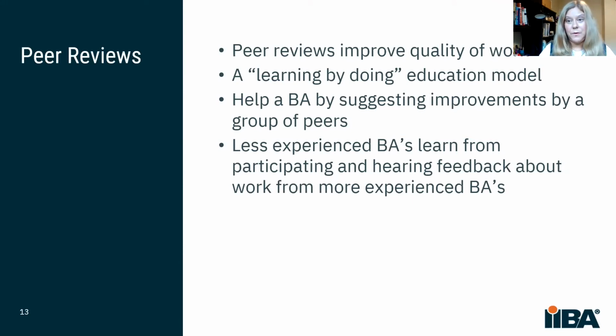We have a peer review in the second week of the sprint. We have an hour and a half where the team will meet, and we set it at that time because we want an opportunity, before we do our sprint review with our business and show them what we did, to show it first to our BA team, and also before we release. We do it at that time for those 2 reasons, because it's an opportunity to improve what we've been working on, what we thought was so great. Maybe we could do it better. And so we have our peer reviews at that time.